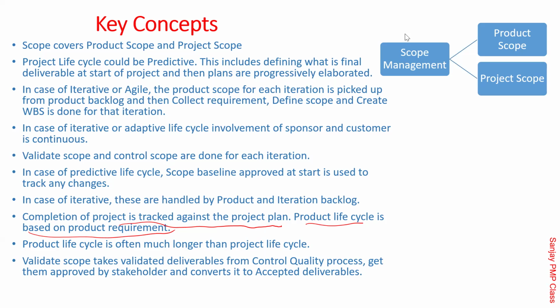Project closure. What do you mean by that? Project closure remained. Sir, product closure you have done, Vishakha, but you have not closed the project. You have to learn lessons. So we have completed everything, but we have to do that final sign off and closure, taking the acceptance from all the stakeholders, taking the consent that finally and formally we are closing this as per the given requirements or schedule.